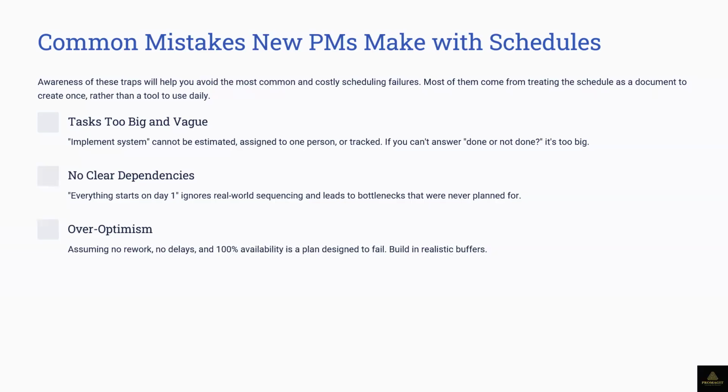Those 3 resources in activity A can also work on activity B, and ideally the two can run in parallel. What that means is that if they are running in parallel, the 3 resources on A will no longer be available for B. So if you want them to run in parallel, you have to get additional resources. Do you have the budget for that?